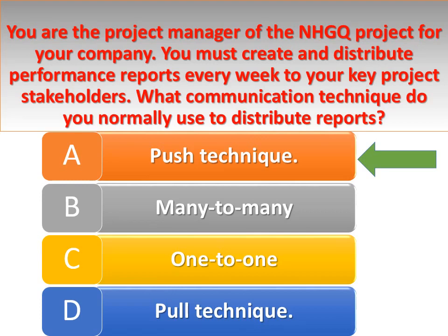Answer A. Explanation. Performance reports are distributed through the push technique. This means that the project manager distributes the reports regularly through a mechanism, such as email. Answer option C is incorrect. The one-to-one technique describes a conversation between two people.